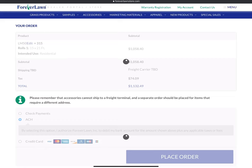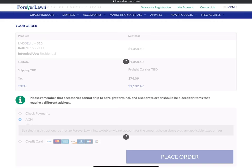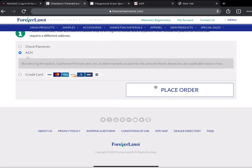We want to have individual orders for individual projects. There have been times when we've made one order for multiple projects. I need canine grass for this project and I need landscape grass for this other project. And what would happen is, if any turf is delayed in that order, it delays the entire order. So we're no longer doing that. Because in the past we've had delays with K9, which they would have the landscape in stock, but not ship it to us because it was all in the same order.